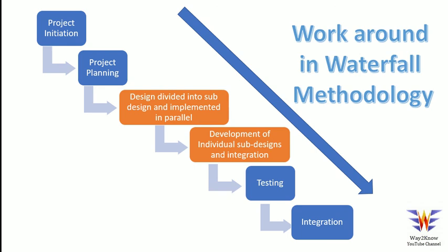People still use waterfall methodology for their designs, because this is one of the legacy methods which have been followed, especially in embedded hardware. Following an agile methodology for embedded hardware has led to several confusions and failures. So definitely for the hardware, it is important that we follow this waterfall methodology, which gives more clarity to the design team, and for the firmware team, the agile methodology could be the one.